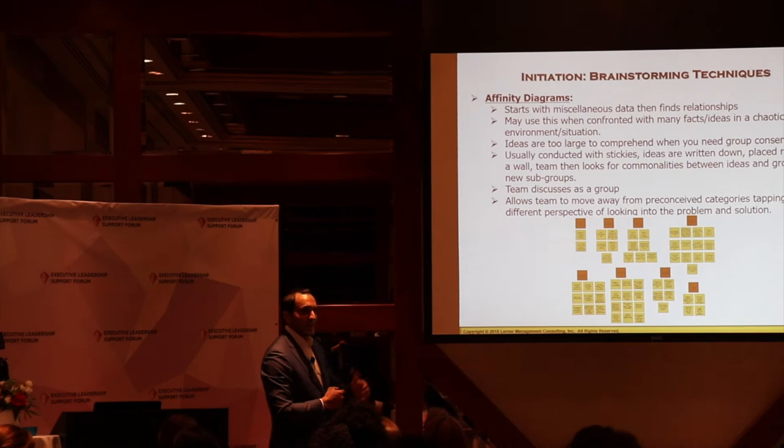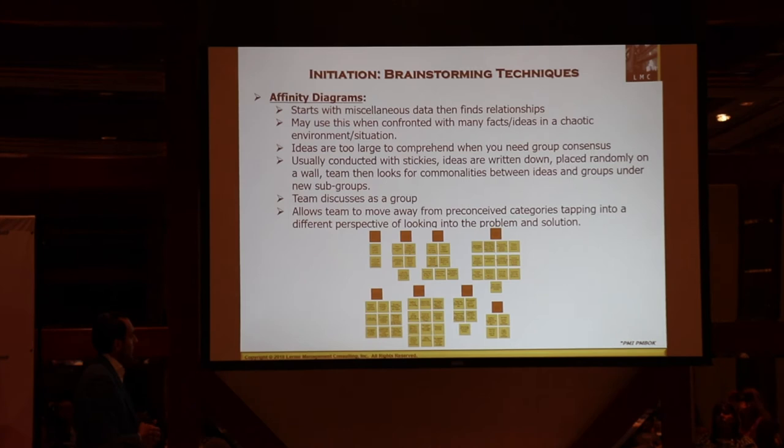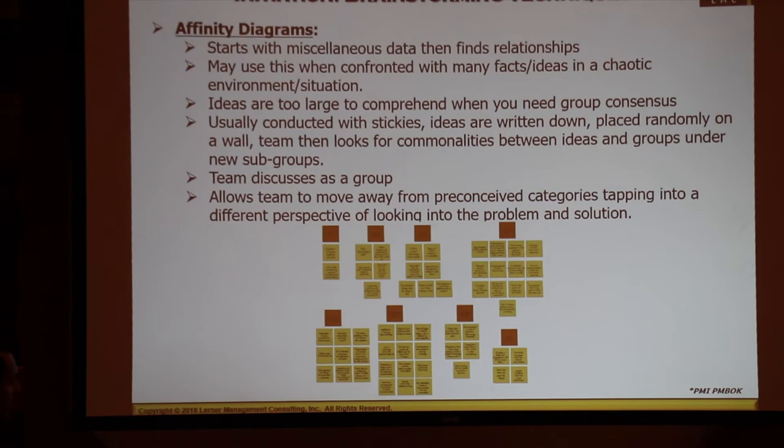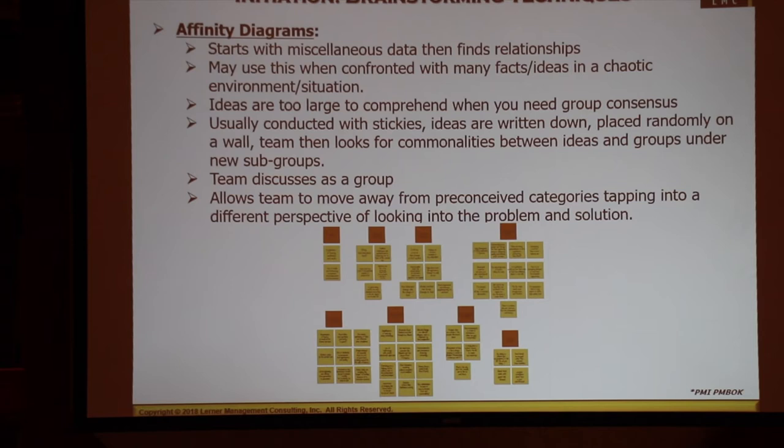Okay, a second technique is actually the converse. We call this the affinity diagramming technique. And basically, similar concept, you want to grab your SMEs, and by the way, don't do this exercise if you don't have the SMEs. It's not worth anyone's while because you have to have the SMEs to provide input. But very similar nature, you would hand out a bunch of stickies. So if I were to book this room here, we'd hand out a bunch of stickies, and we would have everybody jot down ideas about what they know about the project.